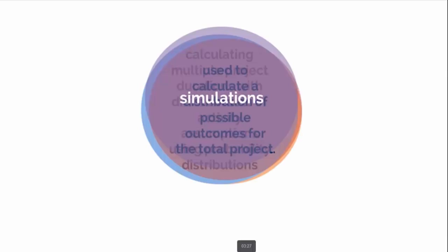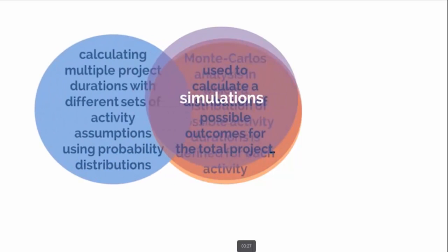Simulations involve calculating multiple project durations with different sets of activity assumptions using probability distributions constructed from the 3-point estimates to account for uncertainty.